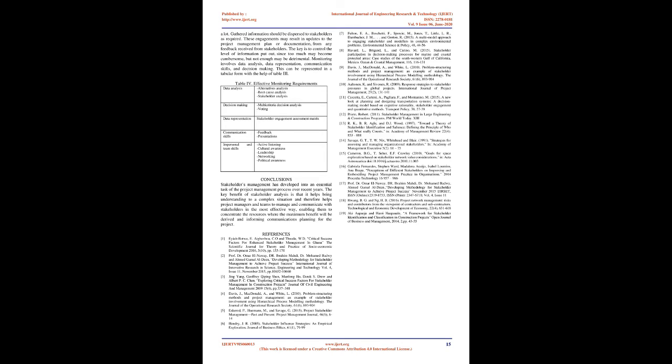8. Monitoring stakeholder engagement. It is the responsibility of the project manager to monitor stakeholder relationships throughout the project with the use of best judgment and the plan to assist him or her. Some additional things that can be used to help with this process are issue logs, performance data, such as completion dates, changes in costs, and any documentation compiled up to this point as earlier. While monitoring these engagements, use all the information available as possible.